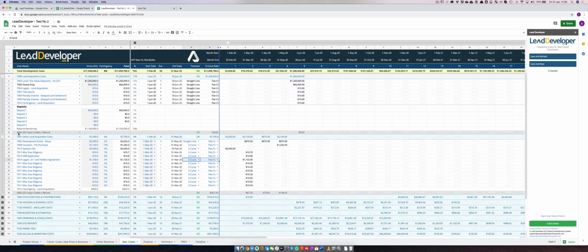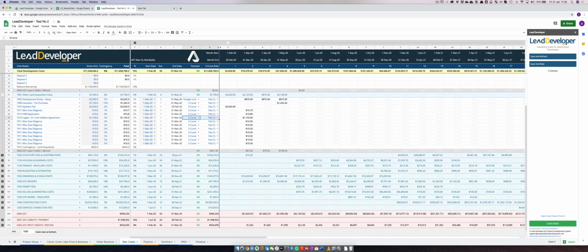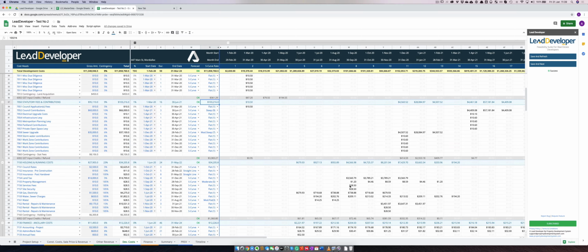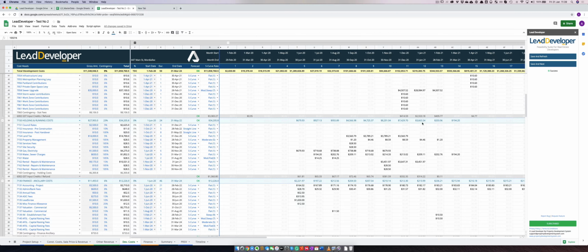We've expanded the first two cost heads. So let me expand the rest of it. When I expand everything, you'll see that towards the end I'm duplicating certain cost codes just to prove a point so that we don't have anything blank, and we are making sure that our total here, which is including the contingency, and that is what we are projecting over here, is equal to the total that we are getting from this side. So this is our cash flow, and it is projected correctly.